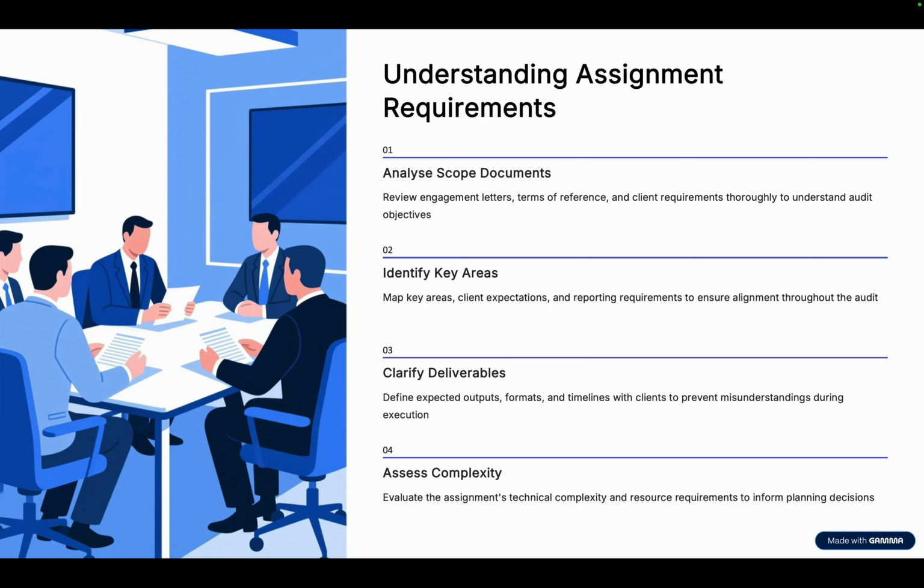If we are doing a cost overrun project, then we need to map the key areas, like we have to have the zero base budget with us, we need to have the quarterly plans, we need to have the annual plans, we need to have the actual execution against that. So all those areas we need to cover. If we are going to do only the reconciliation part, in that case we need to have the procurement part, we need to have the consumption part.